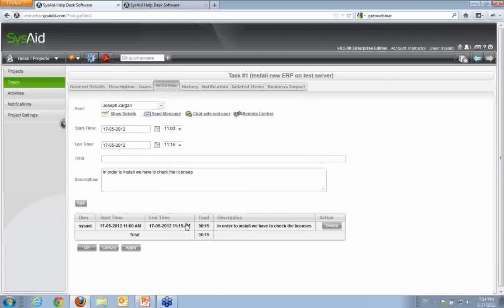In that case, it is recommended that the first time you implement a specific project, you detail every activity, so you will know how much time it really takes, and not have a raw estimation for performing a specific task. After you already know all the activities that every task takes, then you can calculate a specific agreement, OLA, which is an internal level agreement of the departments, and you can have an overall time, according to the resources that you have, of how much time it takes to actually install an ERP.